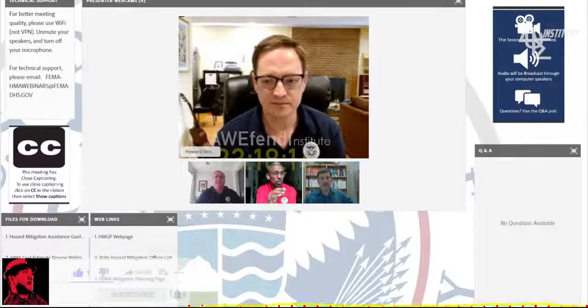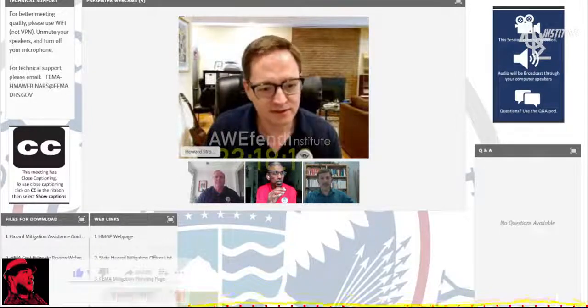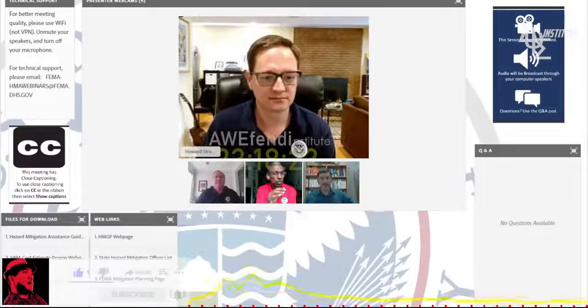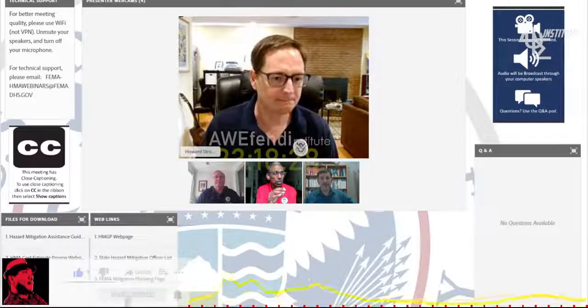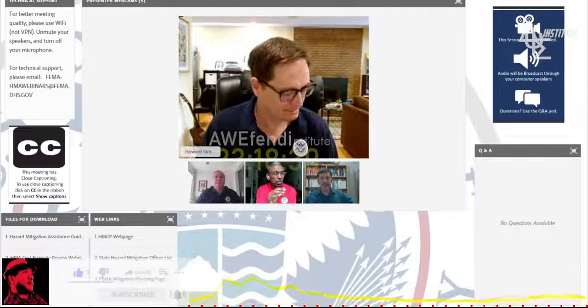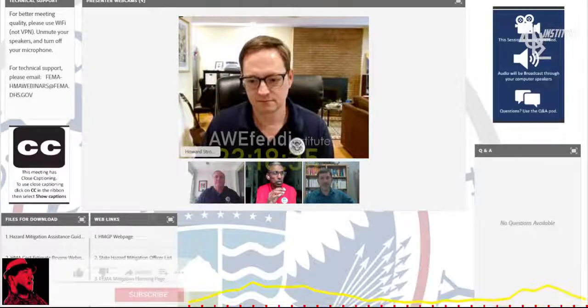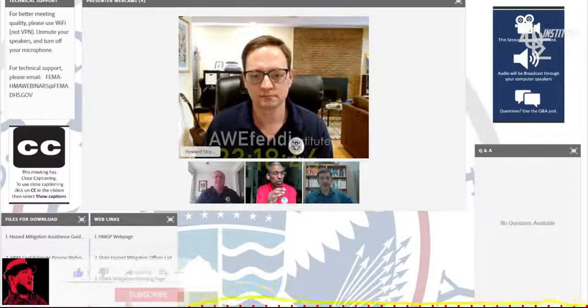All right. I'd like to expand on this point, Howard. Yeah, sure. Go ahead, Abdul, please. Okay, I did specifically mention the location factor. That's why we at FEMA take big caution when comparing prices from different areas, because each site has its own factors, and cost might vary incredibly for the same exact product between one location and another, from zip code to zip code, or even from town to town.